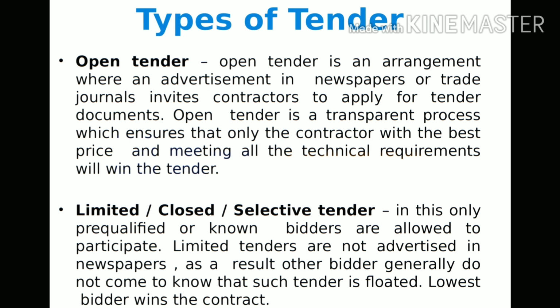Next is limited tender, usually adopted by the private sectors, which invites bids from only a limited number of contractors. That is, only pre-qualified or known bidders are allowed to participate. No advertisements are given in the newspapers. Usually, the lowest bidder will win the contract.